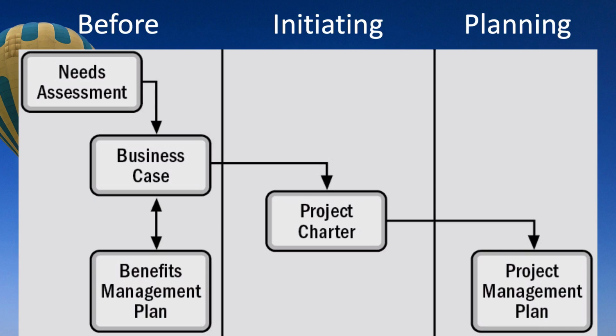And finally, there is the benefits management plan, which defines what success means for the project, how the project's benefits will be realized, measured, and sustained. Each of these provides valuable information for the development of the project charter. Remember that the business case is the culmination of this pre-initiating work and authorizes continued work on the project, just as the project charter authorizes moving on to the next step of project planning.